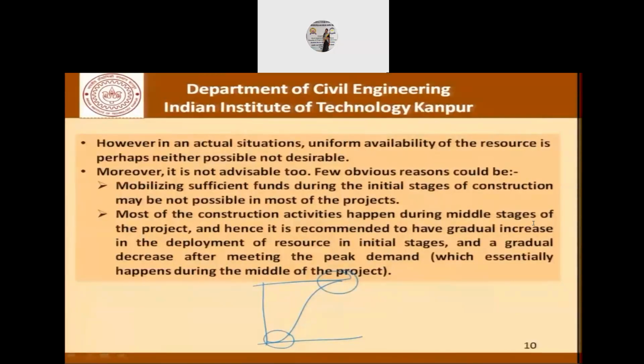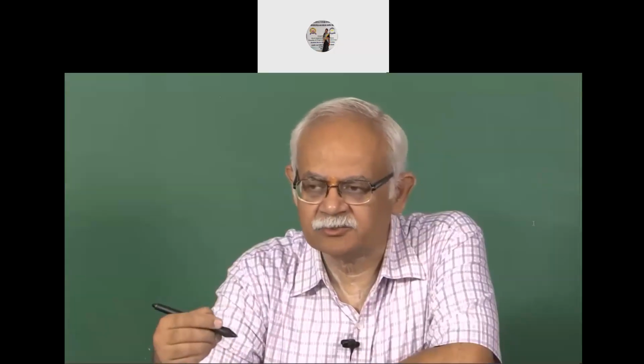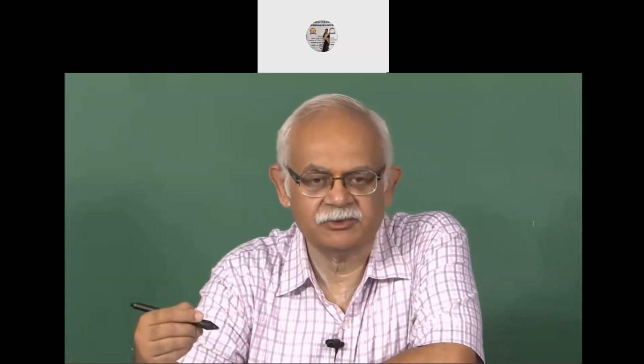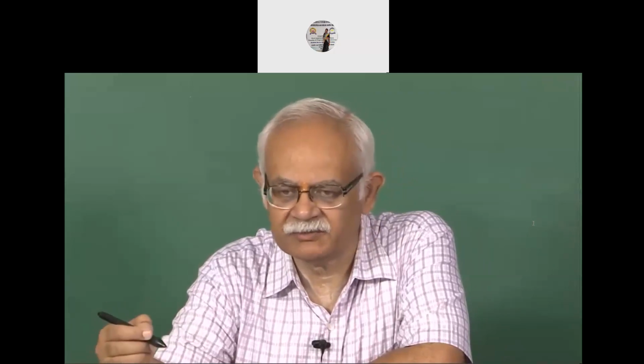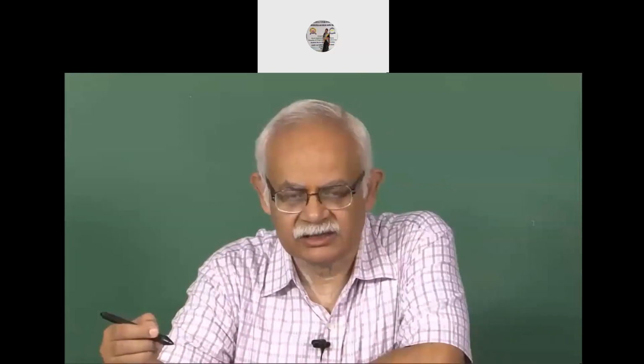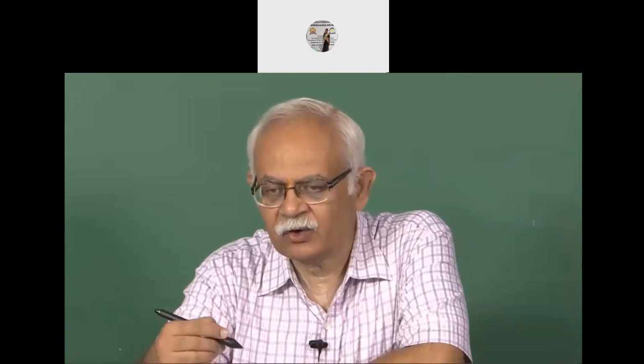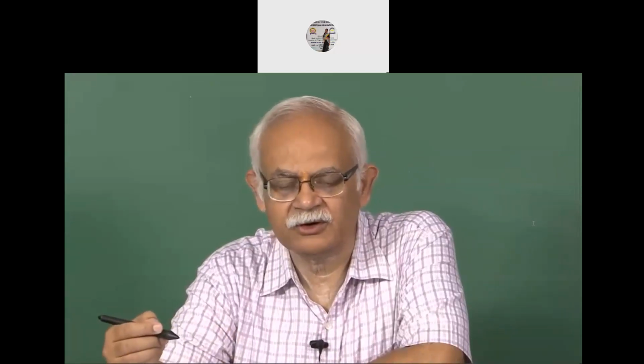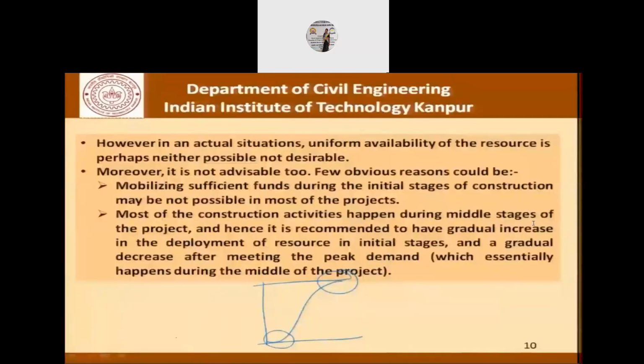Similarly, towards the end of the project, it's very difficult to have the entire workforce working on that project. There will be smaller and smaller areas available, and smaller and smaller amounts of work left, and therefore it makes no sense. It will be very difficult for uniform progress to be maintained.